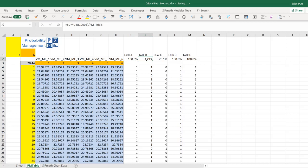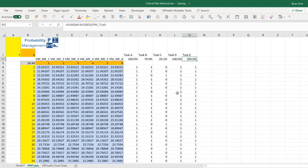Task B, however, if I add up all the ones, it's only on the critical path roughly 80%, and task C 20%, and D and E are 100%.